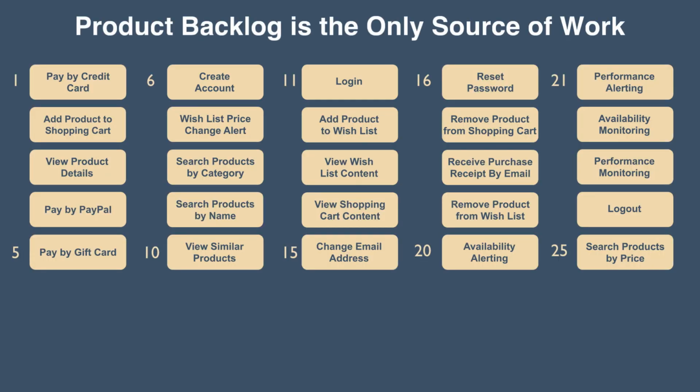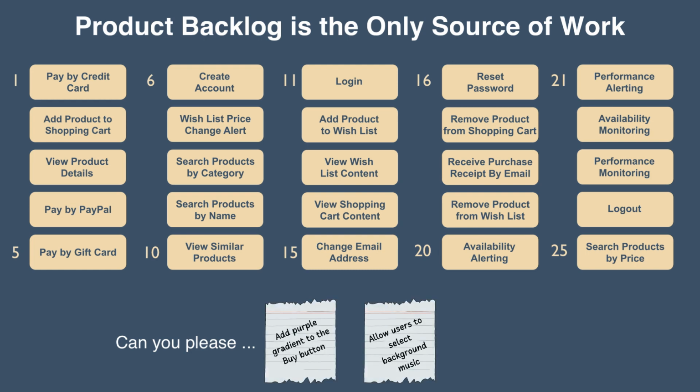Still, another loophole often creates problems and affects the success of projects. It is not uncommon for senior leaders to approach development teams and ask them to work on their ideas that are not in the backlog. It is not easy to say no to people with authority. Work is accepted, and because the team spent time working on that feature, something else was not completed. Also, developers might decide to work on things they think are good to have, and the same thing happens, but backlog items are delayed.